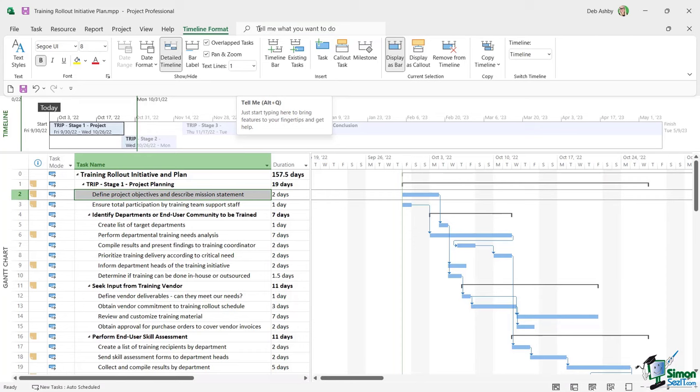Date format will differ depending on your location. I'm in the UK but have my copy set to US date format. I prefer a concise date display so I'll change it to a shorter format. Moving to the Schedule page: under Calendar Options, the default settings are Monday week start, January fiscal year start, 8-hour working days, 40-hour weeks, and 20 days per month. We'll cover calendars in more detail later.